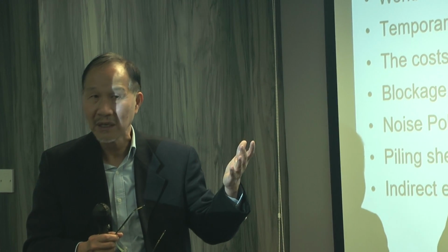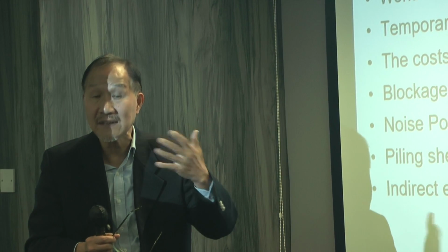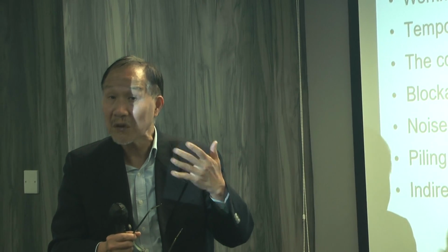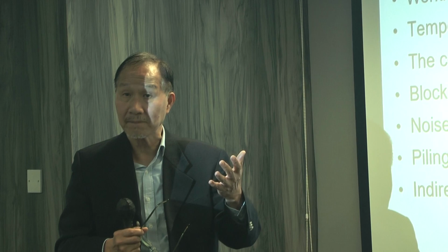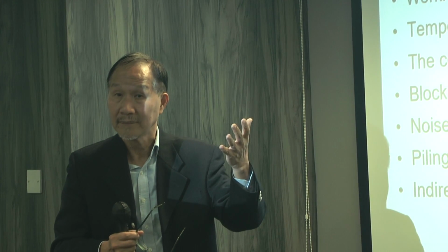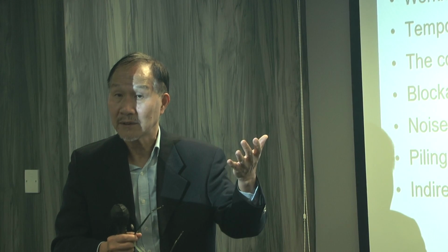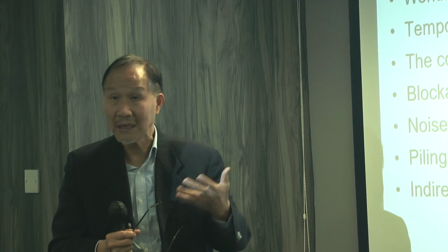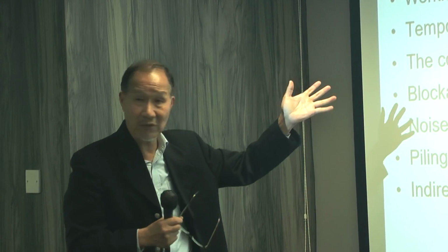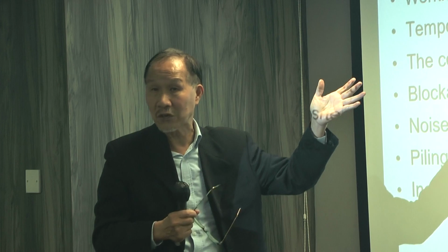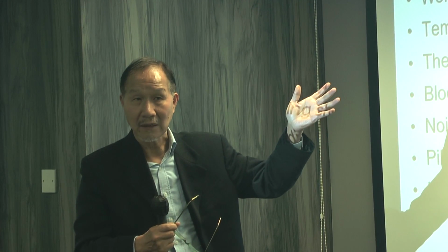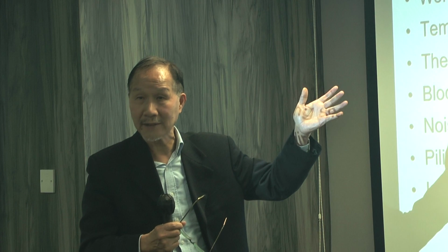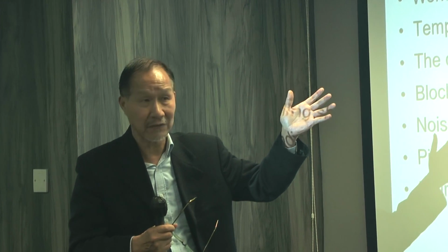Flooding could be one of the reasons for the delay, may not be the only reason. A fire that damages a building is direct, it's the proximate cause, so the insurer pays for that. But delay could have many reasons, even natural ones, or holding up money for approving projects. This is not the subject for insurance.